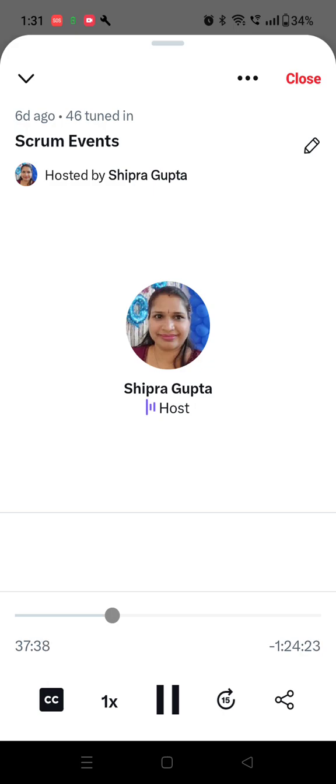Now you'll arrange those items: what needs to be done first and what needs to be done second. Certain user stories will be dependent on other user stories, right? Till that story is not taken up, you cannot work on this one. If B is dependent on A, you need to do A first and only then B. So you'll say, okay, A, X, M, these are the three stories which I need to do first.